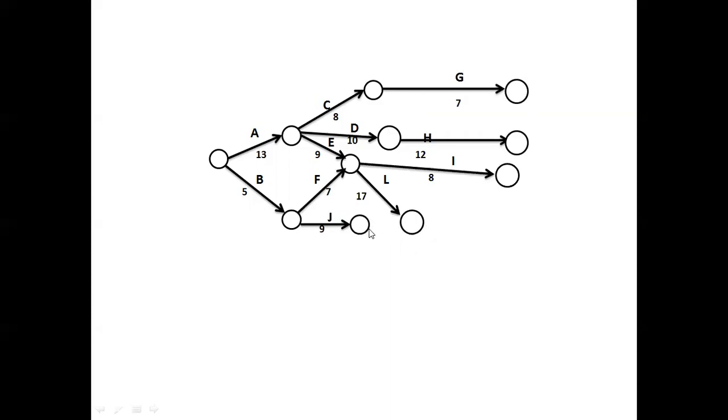Here I make some sort of modification in this. I draw K. After that, I draw L, because in the next constraint, L is also controlled by K. So this constraint has been given. This activity L is also controlled by K, as well as L is controlled by E and F.